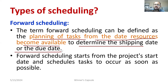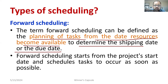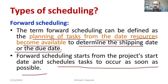When material, machines, and everything is ready, then delivery follows — that particular scheduling is known as forward scheduling. Forward scheduling starts from the project start date and schedules tasks to occur as soon as possible. As soon as you deliver the material, you can start the project work, and then you can estimate when the project will be completed.